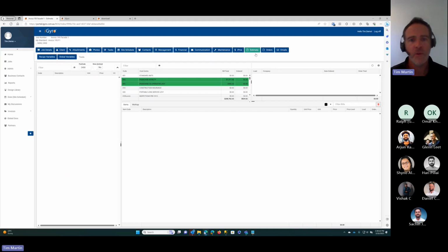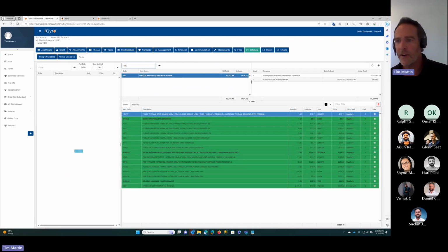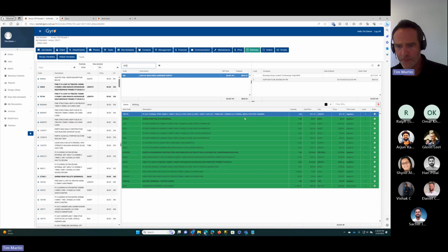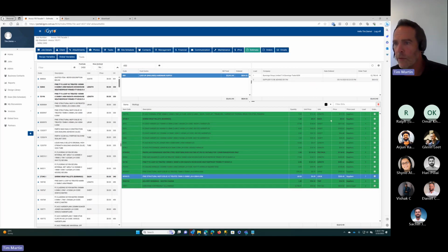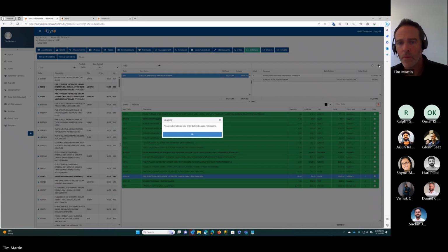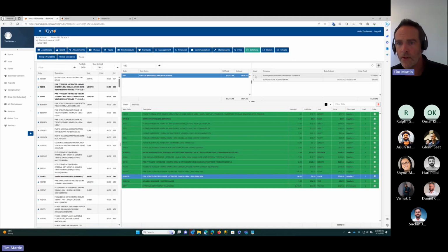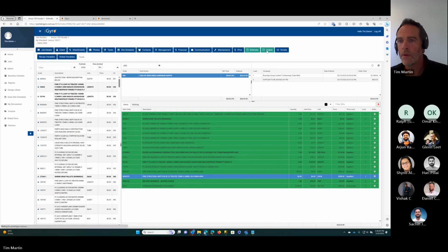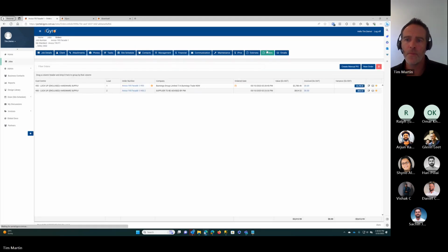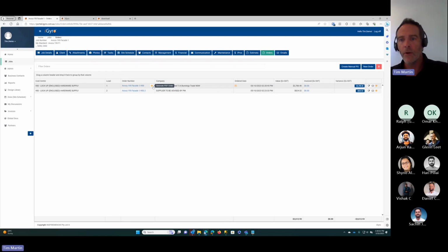You need to be careful if you do this because if you've already sent this out to your suppliers, they may already be actioning that purchase order. So you would need to communicate effectively with them that you've changed it. Alrighty, so you can go ahead and make your change if you need to. Okay, and then we'd just be relogging that order. Just need to select that load there, log that one. Go back to orders. And we would need to generate that order again.